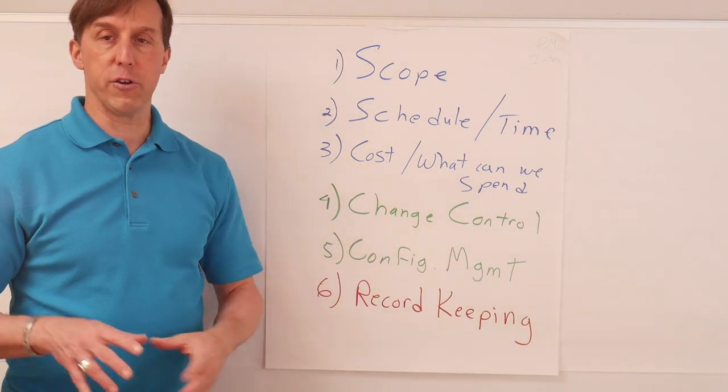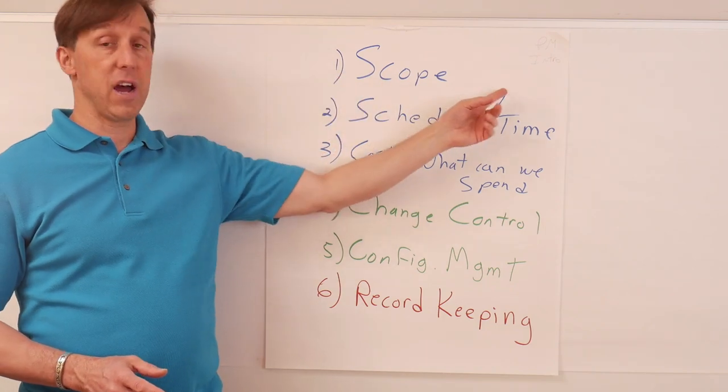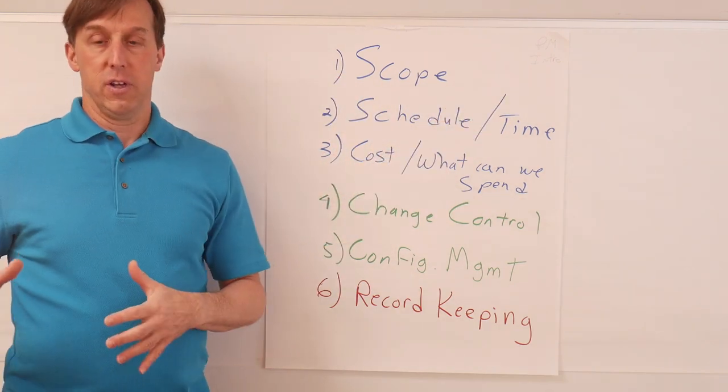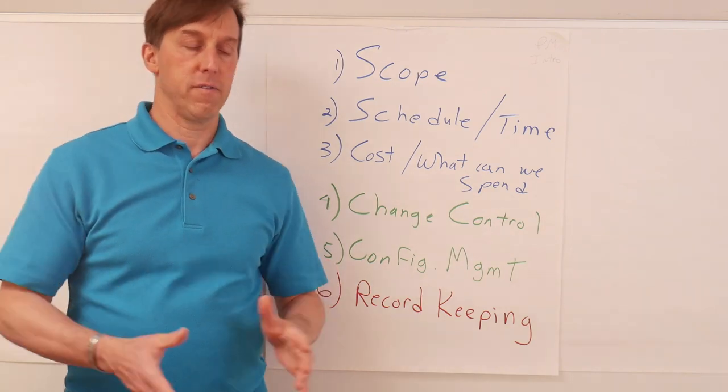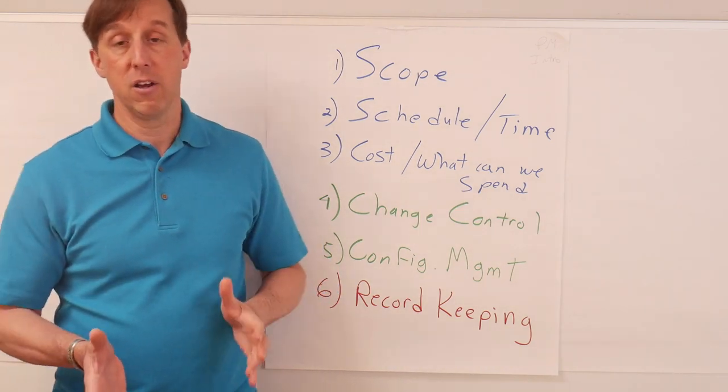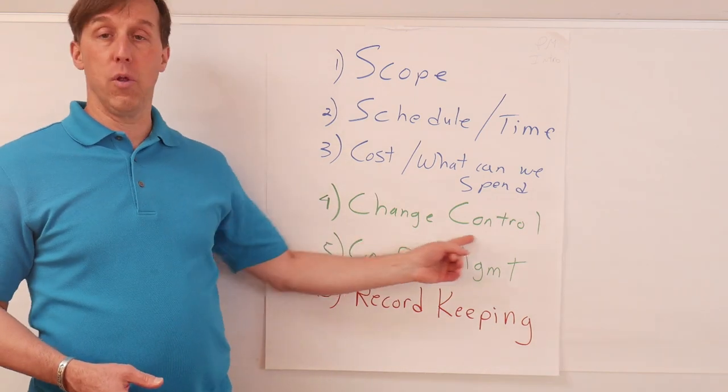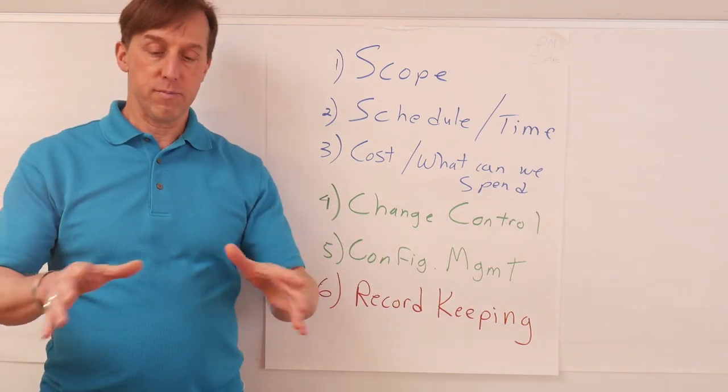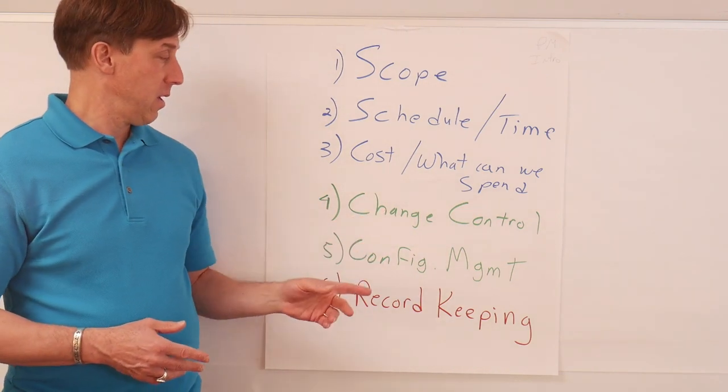Now, change control will allow you to track where is the design. Okay, so scope involves the design. Change control is, all right, we know where to find the latest design. So if, for instance, if we have to build a power supply off of a satellite system, we can go to the latest version, make an estimate of how much power it draws, and then design our supply accordingly.